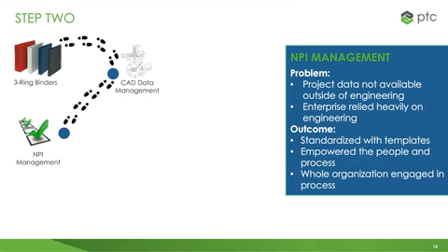Currently, we manage 19 active templates over 9 distinctly different categories, including product realization, so new product categories, tooling, manufacturing, and even IT. There are currently over 130 new product projects running. Over half of those projects have new technology. We manage all these projects with 4 project managers.